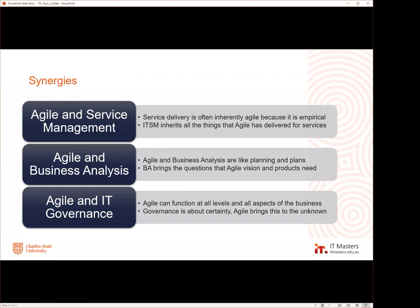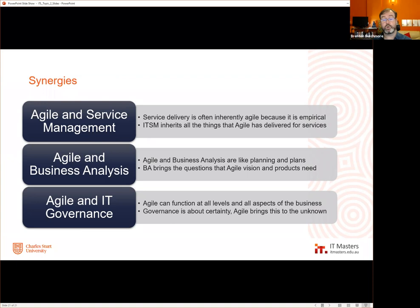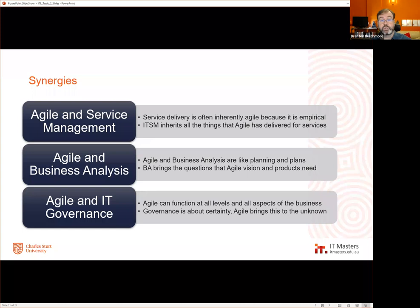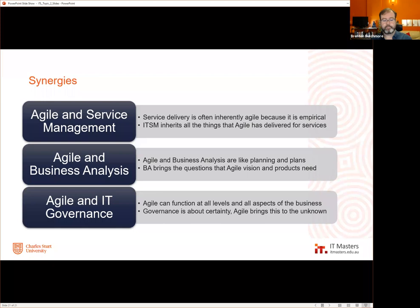A couple of linked questions from Carol and Michael: how do you budget for agile projects where the result is possibly always changing, and how do you quote a project based on this approach? You budget based on the vision and you quote based on the vision as a starting point. You also budget based on the parameters and restrictions. Sometimes a customer will say, I need this result — and the result is more important than the exact cost.